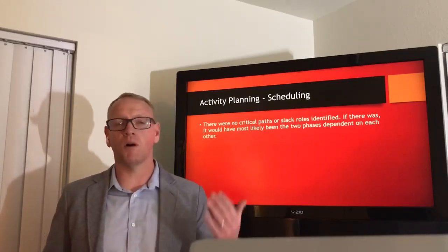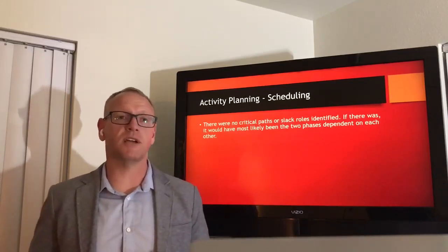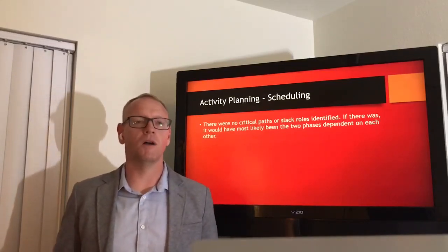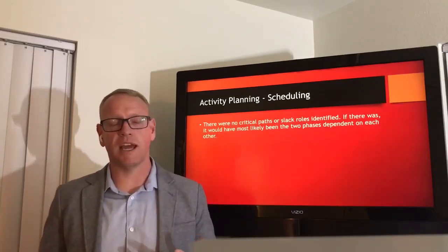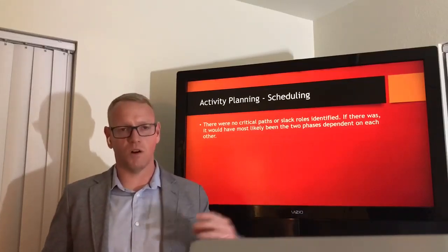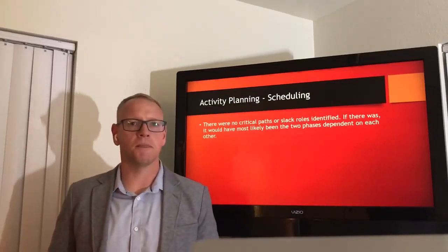At that same time, all of those tasks within that second phase started at the same time and weren't interdependent on each other, and you had the 1 week to accomplish them all. So again, there were no critical paths or slack rules identified within that. It would have looked somewhat like an hourglass on its side or an infinity sign where everything was on one, it all merged in the middle and then split back out until the project completion.